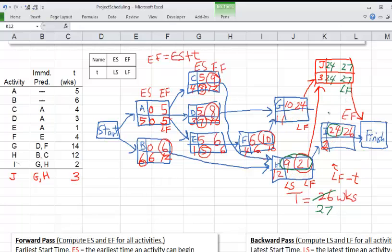And now I will also have the LF of 27, and 27 minus 2 is 25. And then H is going to be pointing to both J and I, and here we have 24 and 25. So the smaller number will be written here, and here the same thing, 24. So 24.